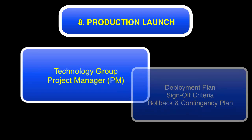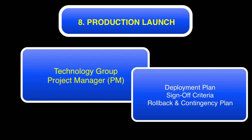The last piece is production launch. The technology group project manager is in charge. They have to create a full deployment plan, including staging and sequencing of the individual system rollouts involved in the project. They have to define sign-off criteria for a successful launch. And if the launch isn't successful, what's the rollback plan and contingency plan in the event the launch is unsuccessful?